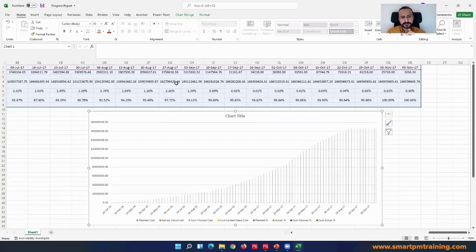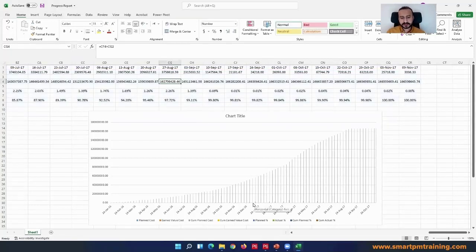The second reason is you are showing that I have 10 millions planned. But for me, it doesn't mean anything. Is it 10 millions from a project that has a contract value of 20 millions, which means 50% of the project, or it's 10 millions out of a $10 billion project, so 10 millions are really inferior in this case. So the number itself doesn't give me the whole picture. I want to convert it to percentages. I can understand right now, regardless of the value, I have 2%. It's something measurable. I can measure. So I want to show the percentages.